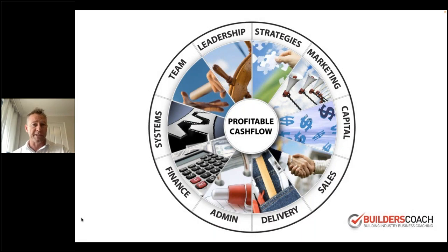But if things are going well, which it is with you guys that are working with me, with most of you, you'll be able to forecast when you need to build or improve both your team and your system. So maybe you're going to put a new system in, like Procore or Buildertrend or Companion Systems, whatever it is. You want to time it. You don't want to wake up and go, oh, we've got more jobs on than we've ever had. Oh, we need a better scheduling tool, or we need another supervisor. That's too late. You want to be able to see it 6 or 8 weeks out, like a windscreen that you're looking forward through, so that you can start the recruitment process, which, by the way, most guys are doing by jumping on Seek, Indeed, Gumtree, LinkedIn, and also their socials, as well as using agents to get guys from overseas.